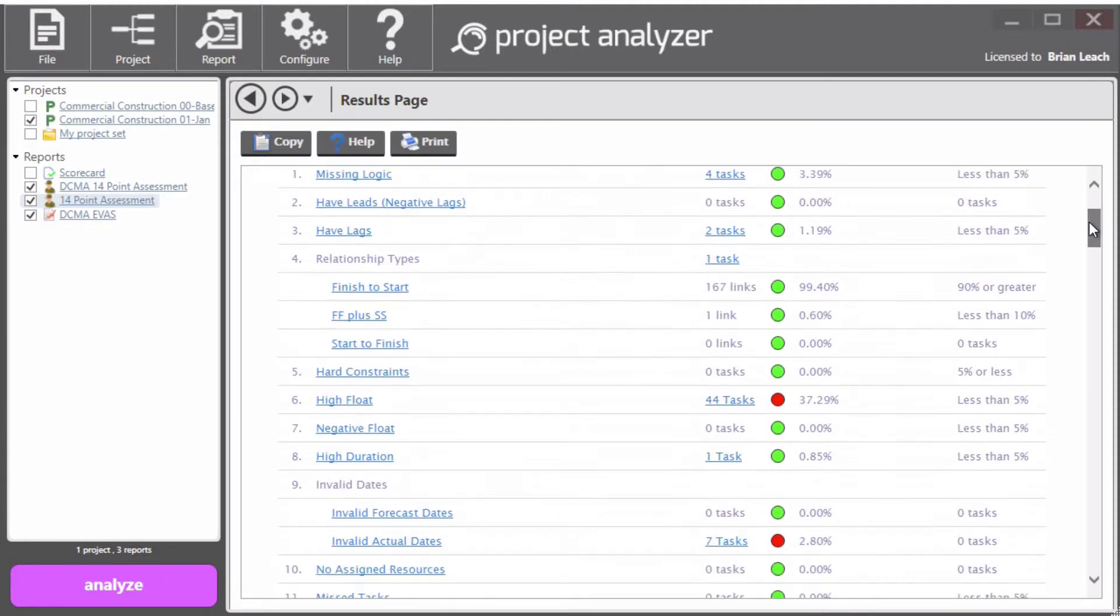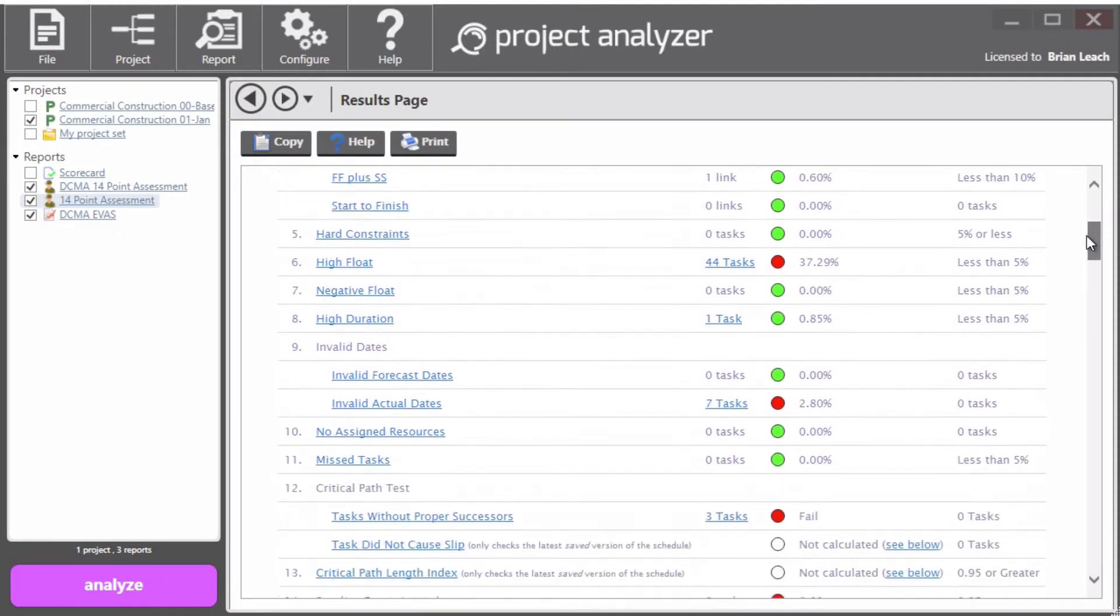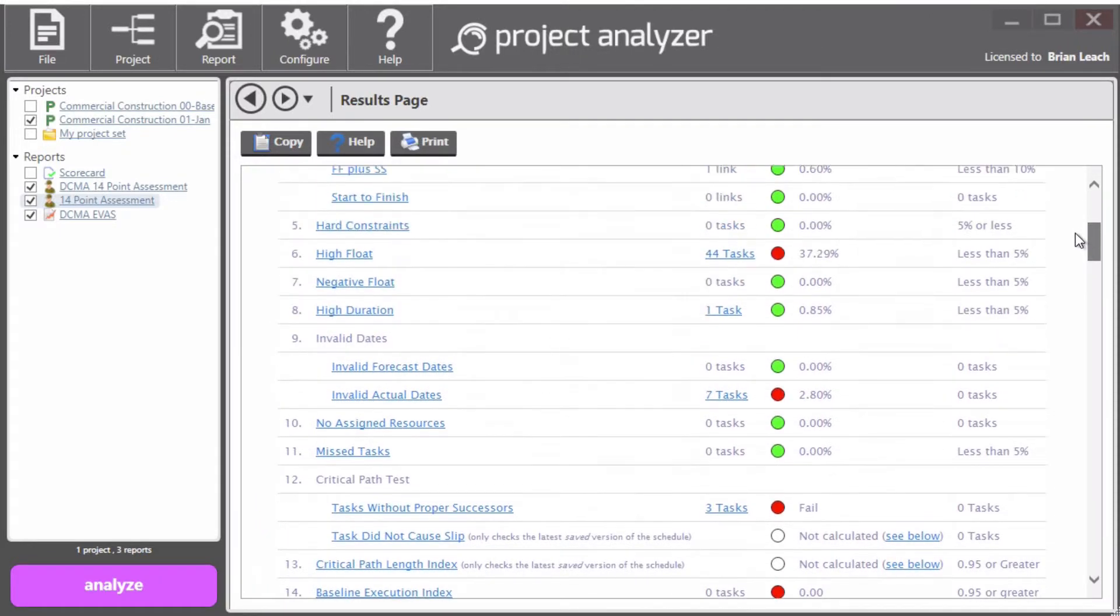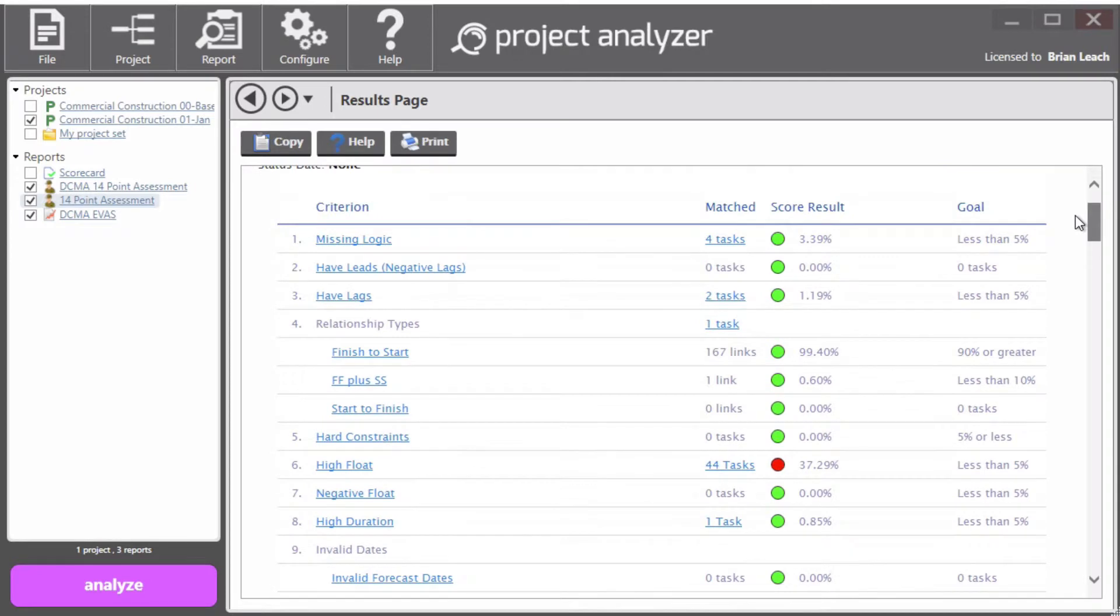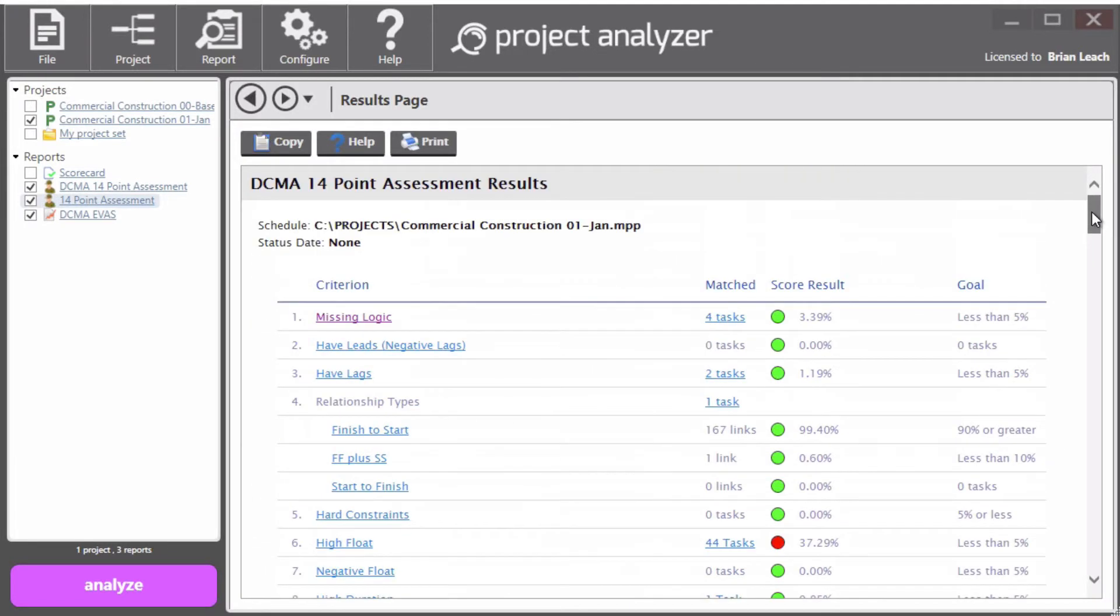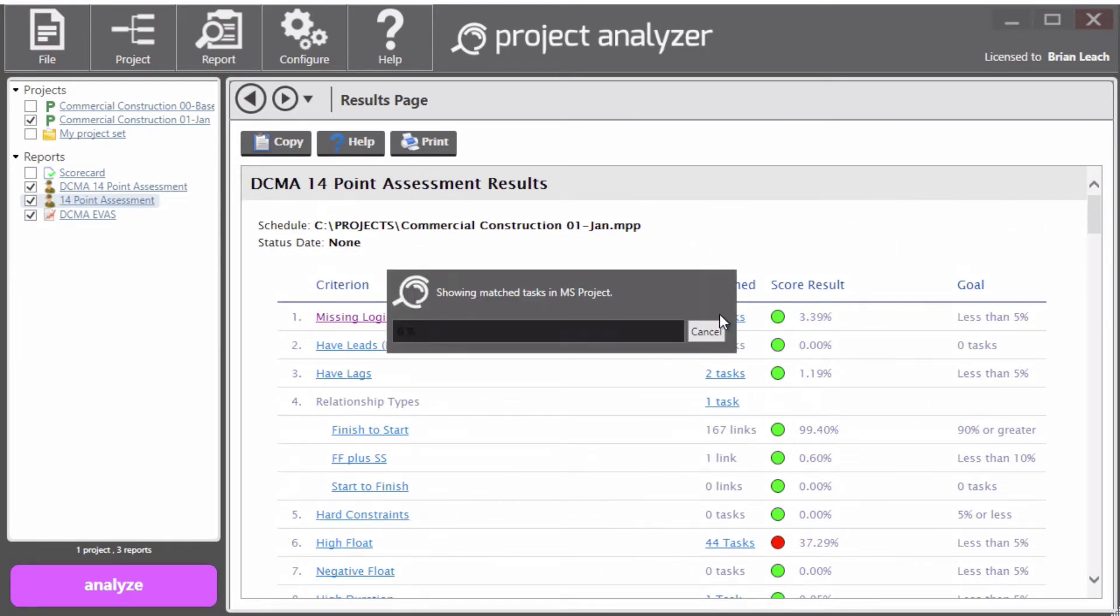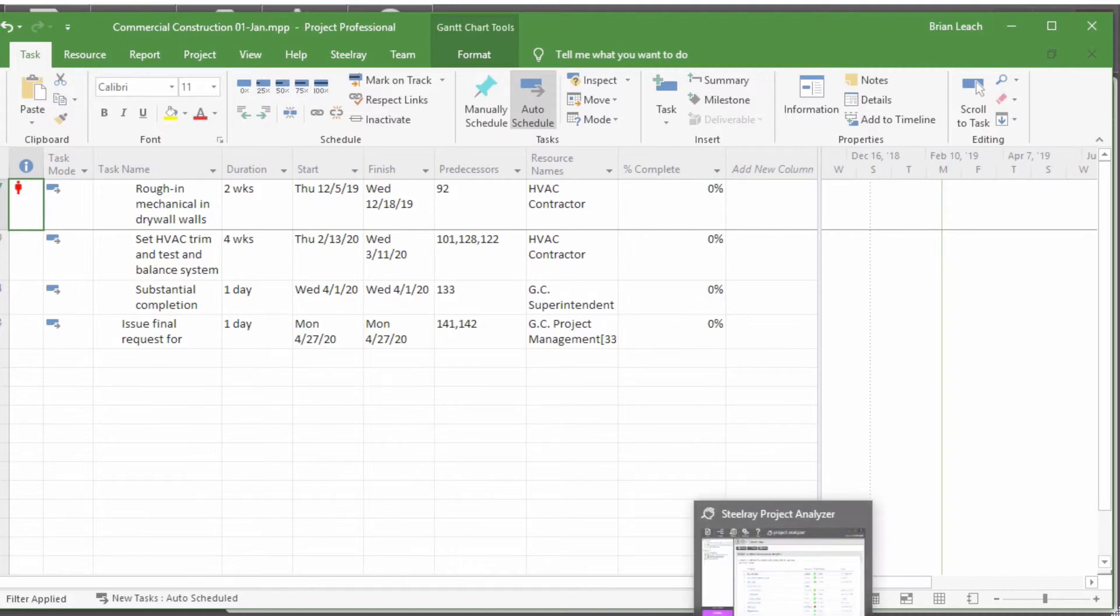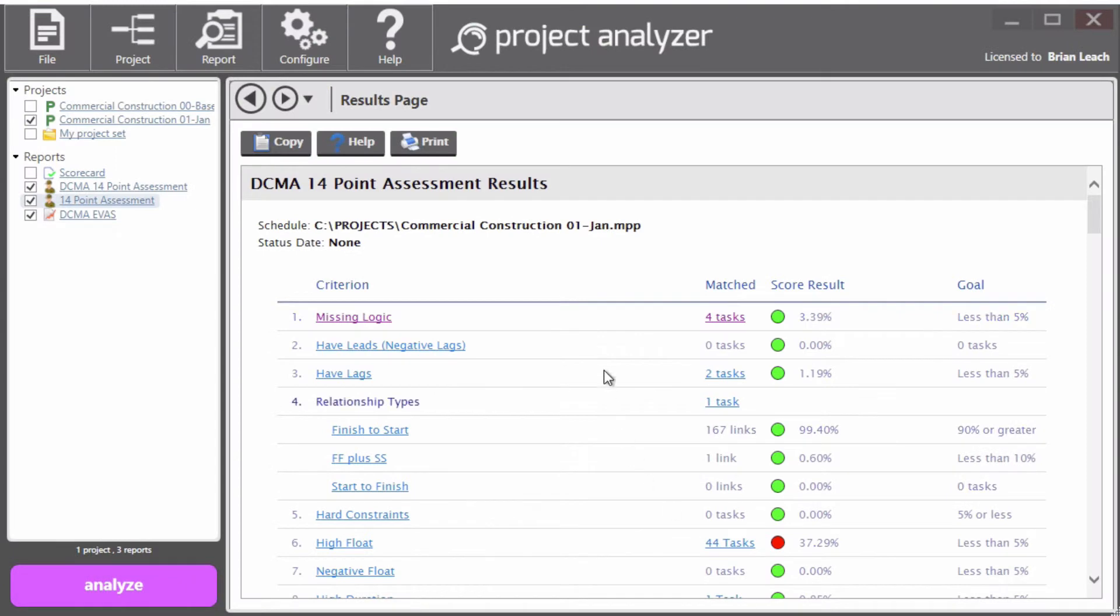And it looks a little bit like our regular scorecard report. If you click on the name of a check, it gives you a little bit of help and a score and we color code the score for you. If you click on matched, it will take you into the four tasks in that project file that were missing logic in this case. So it's a very quick way to jump into the schedule and see what the DCMA check actually caught.